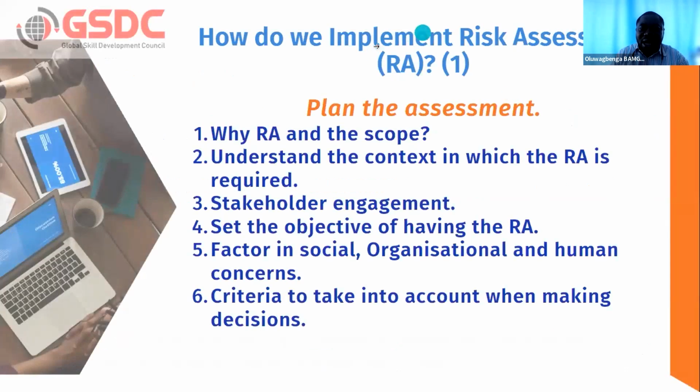All right, so after looking at the adoption and the benefits, how do we implement? How do we implement? Okay. The first thing we need to do is to plan the assessments properly. I've actually brought this under planning the assessment. And under planning the assessment, you tend to ask, why are you doing it? What is the boundary? What's the scope? Which areas do you really intend to cover? That question must be answered. Because largely it will help us with the kind of techniques that will be adopted.